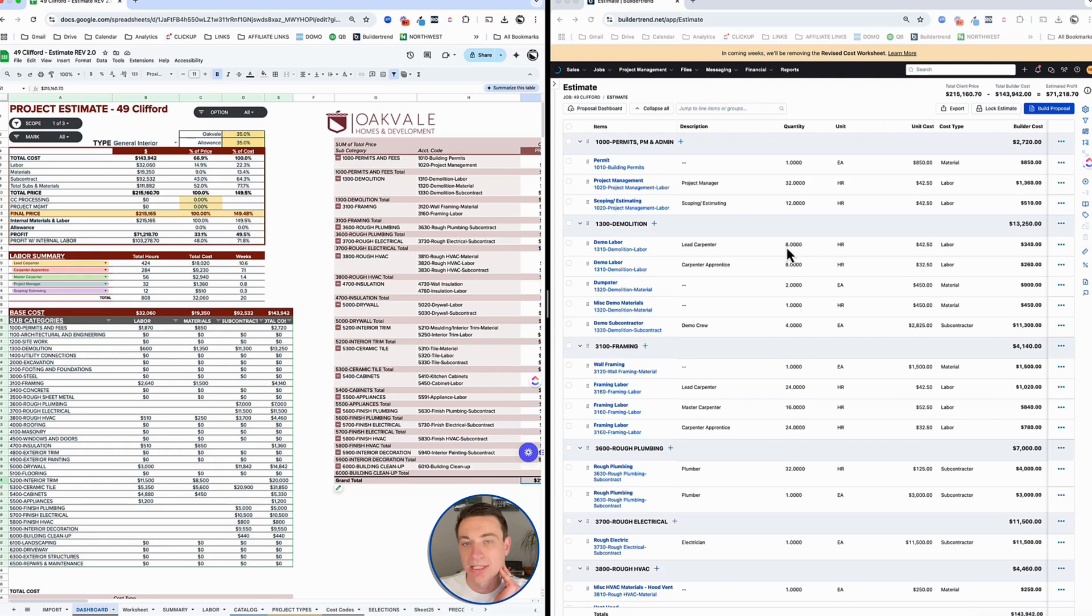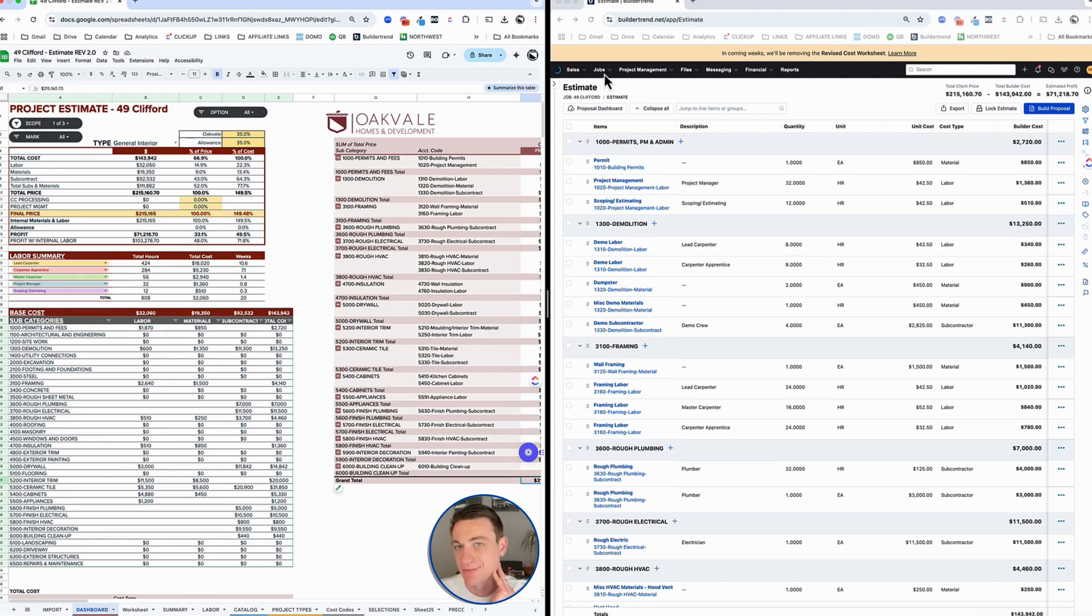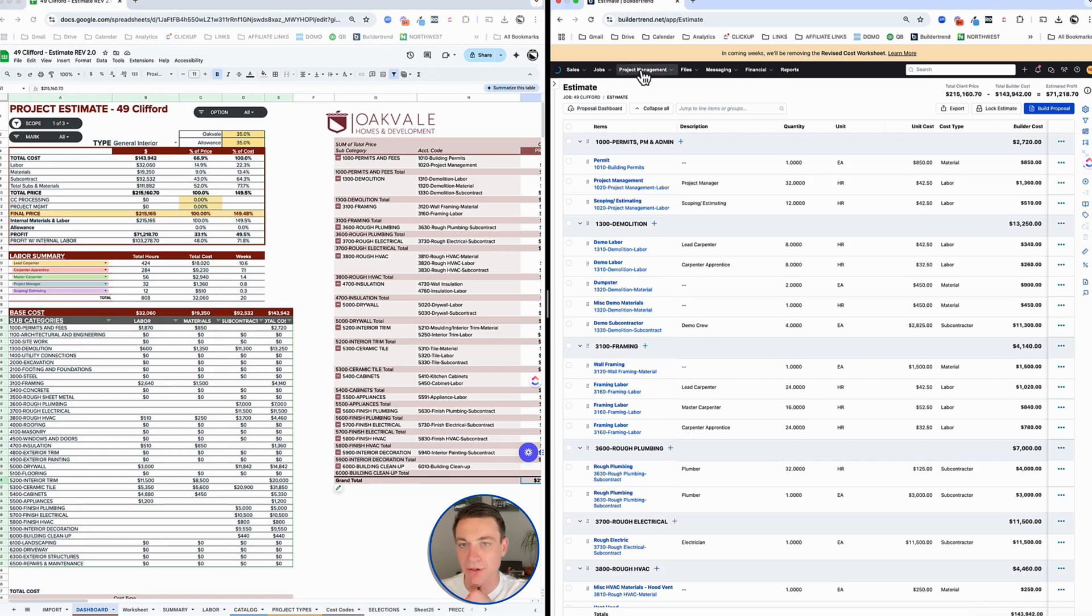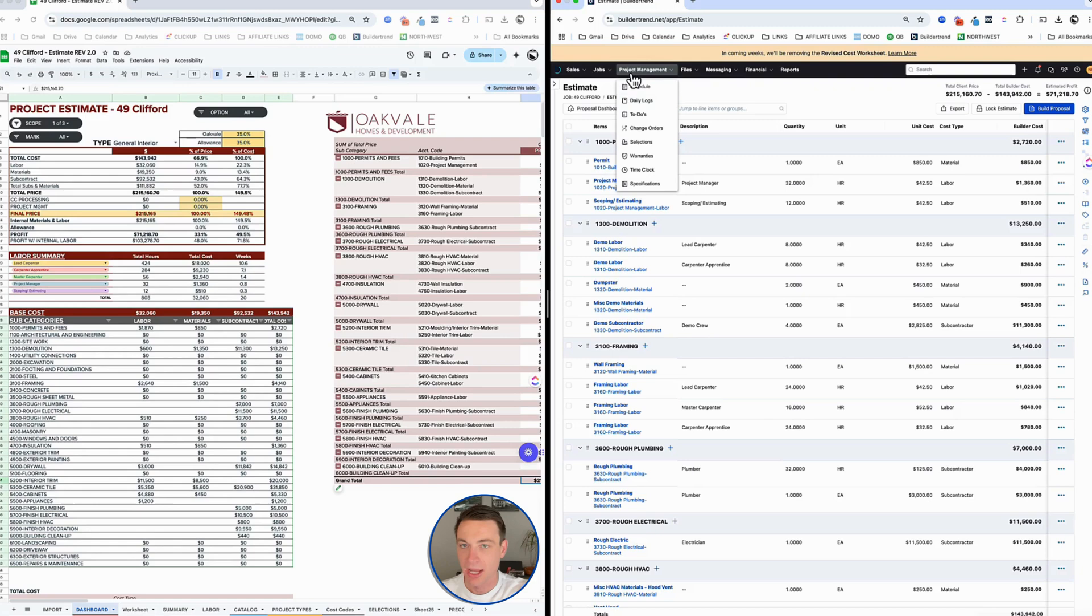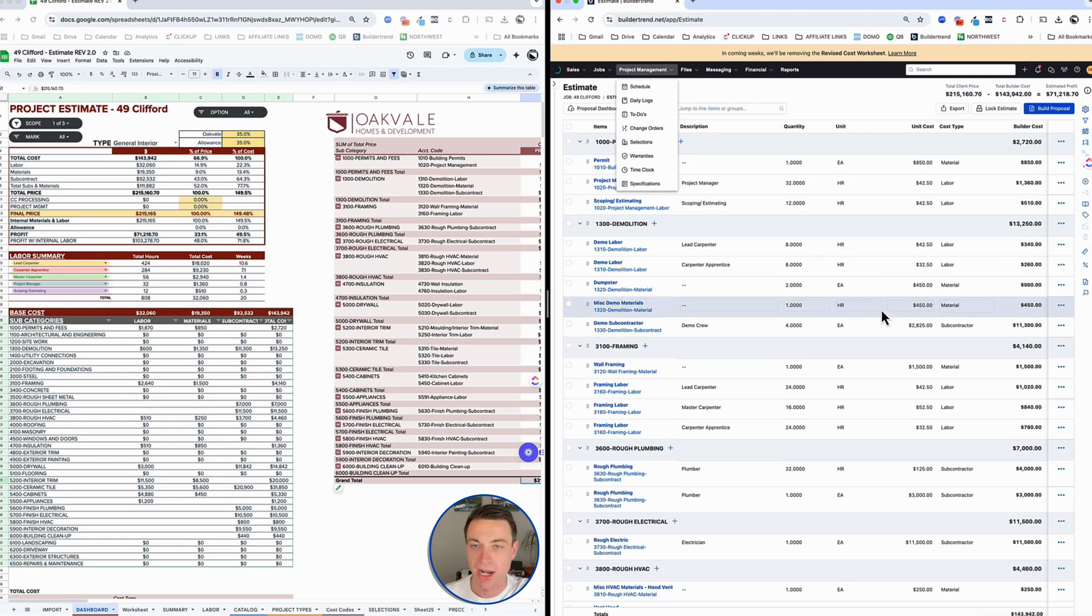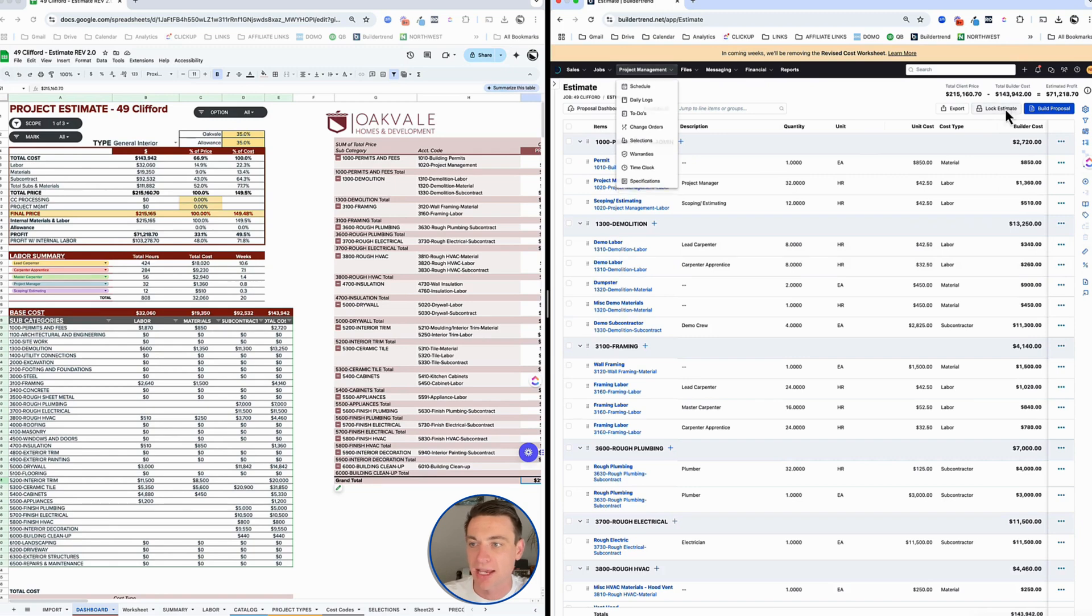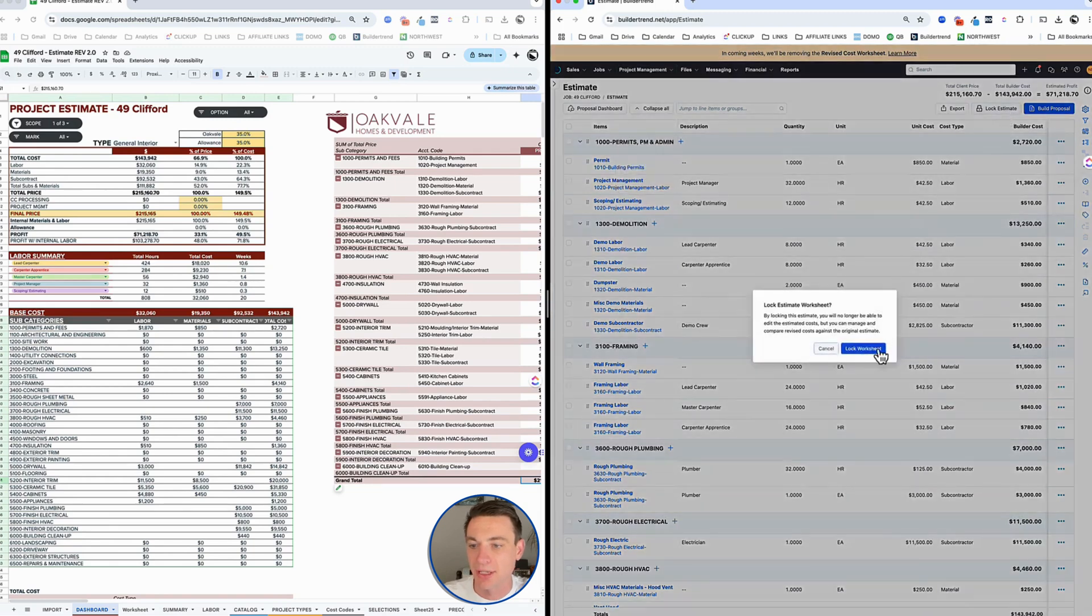If we want to add allowances, we don't do that on an import. We add allowances currently - I do it manually, or you can make catalogs for it. But if we add allowances, I would prefer to do that separately. You go into your selection and add those separate. Now from here, I want to lock that estimate. This specific project doesn't have any allowances because we're using a designer and designer's picking out most of the stuff. So I'm going to lock that estimate and lock that worksheet.